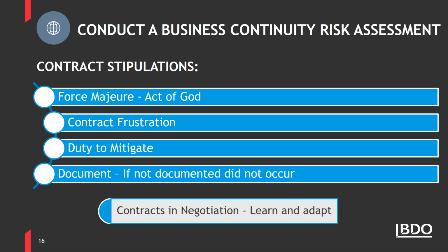A situation may arise for which the contracting parties made no provision in the contract, and the performance of the contract becomes something radically different from that which was undertaken by the contract. This is a high bar to show that the performance is impossible. The doctrine provides safeguards similar to a force majeure without it being explicitly contemplated in the contract. There are many nuances to all of this.